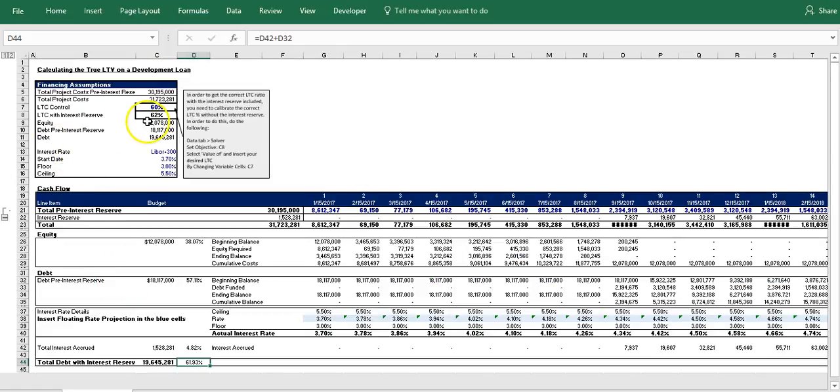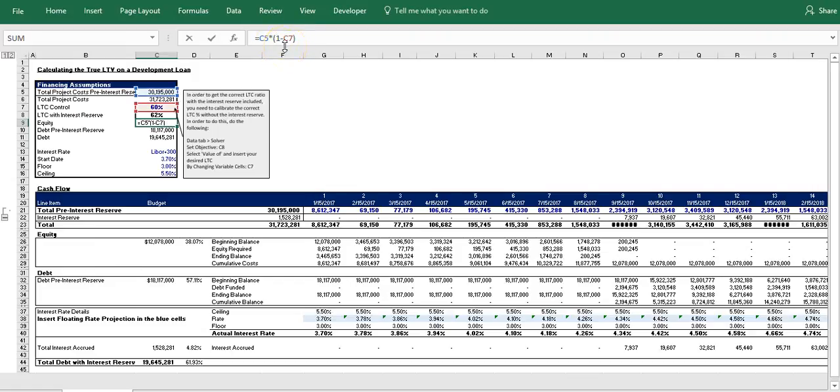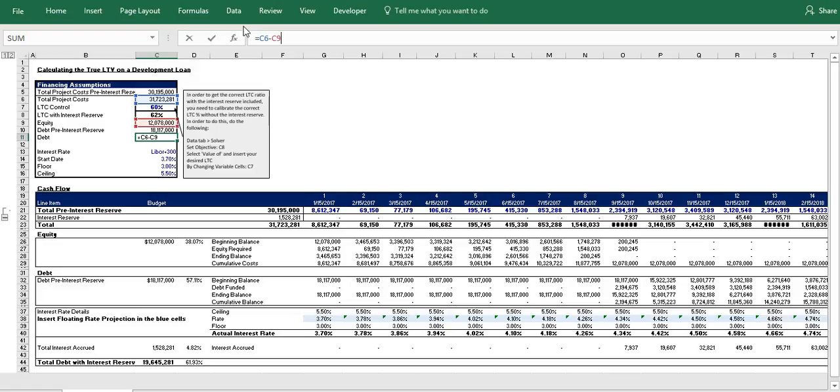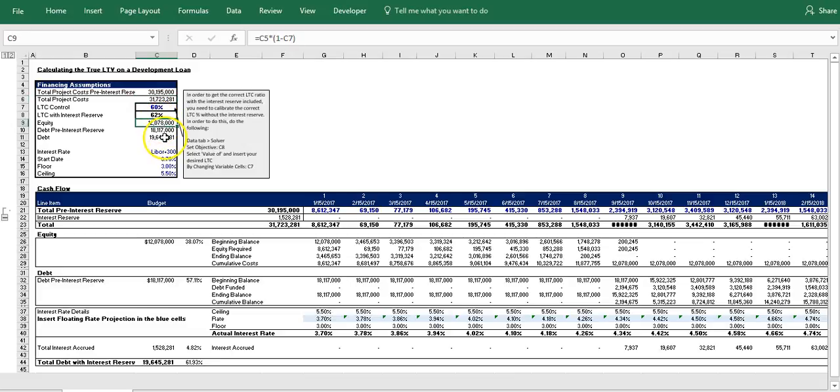Now if we go back up to the inputs, we can see that we have our equity which is basically saying we have our total project cost pre-interest reserve times one minus 60%, giving us 40%. Our debt pre-interest reserve is basically 60% times the $30.2 million. And this is our actual debt with the interest reserve. So as you can see, this formula takes our total project costs and subtracts the equity, and that gives us our actual debt payment when you include interest reserve.